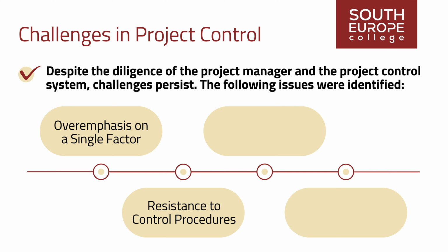Resistance to control procedures. Some project team members resist or fail to comply with control procedures. This resistance may arise from a lack of understanding regarding the benefits and necessity of formal controls. Managers contribute to this non-compliance when they do not enforce sanctions against individuals who defy the established procedures.